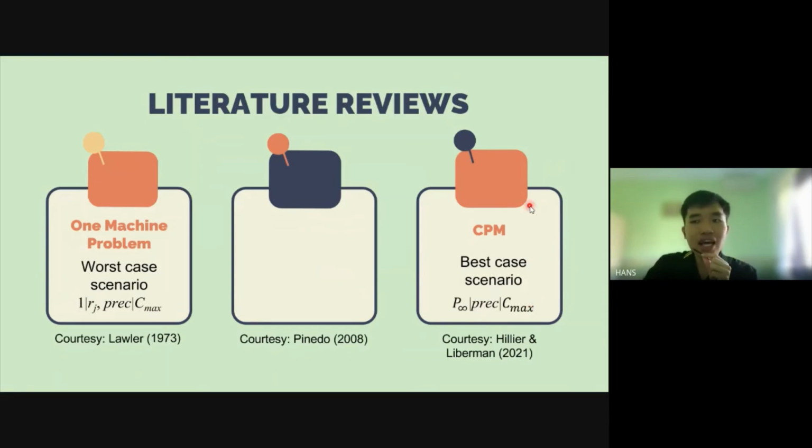Although it can guarantee the optimal total time, using the critical path method solution the company needs to pay higher expenses to support the jobs, because less total time indicates more machines to use, and more machines indicates more expenses to spend.